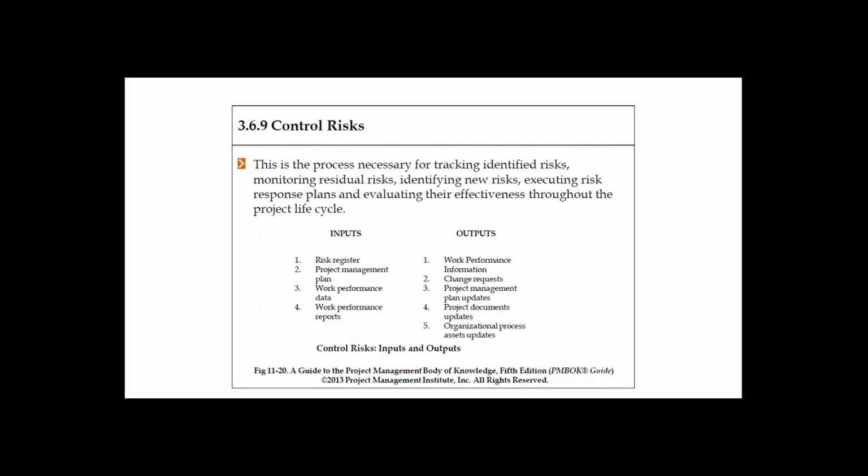But will that always work? If we are not installing a 360 degrees camera, and it has just 260 degrees of coverage and 100 degrees is still not covered, you still have a risk that the camera might not capture the movements which are outside the area of the CCTV coverage. So you still have the risk if you choose to install that kind of thing. That is called residual risk. We can come up with more examples when we go to risk management.